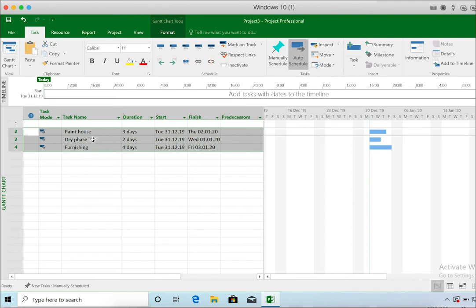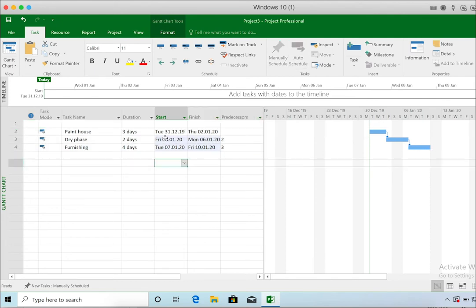So you have to select the tasks, and then you click here on link the selected tasks. And now watch what happens on the Gantt chart. So I press the button, and now boom, you can see these are linked in the right order. So this is just an example of what the task menu is for.